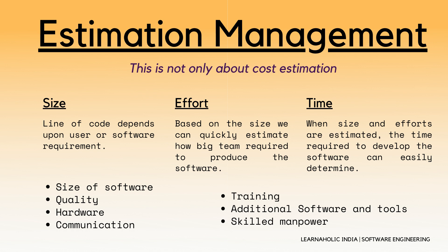If we talk about time, when the size and efforts are estimated, the time required to develop the software can easily be determined. And if we talk about cost, it includes all the elements such as size of the software, quality of the software, hardware used, communication, training, additional software and tools, and skill and manpower.